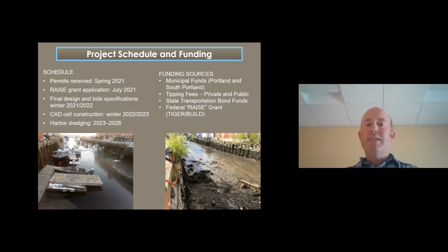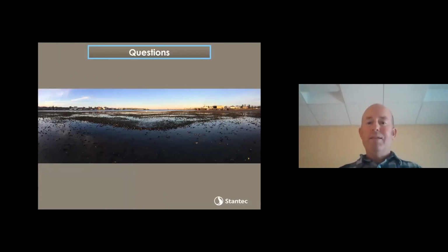There will be tipping fees associated with that. The federal USDOT grant requires a 20% match, which will be in part paid by tipping fees, which are looking to be around $12 to $15 per cubic yard. The Maine DOT is also matching those tipping fees as part of the process. A lot of information, run through relatively quickly, but we're open for questions on any aspects of this.